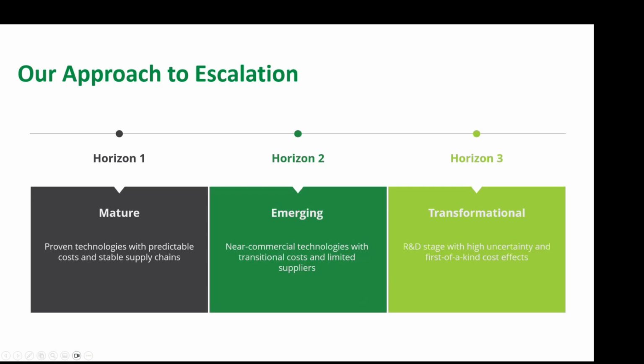Escalation was also an area that Transpower didn't have super long-term information readily available. So again, we worked with Mott MacDonald to come up with an approach for Te Kanapu. And so escalation in this context is the increase in project costs within an estimate over time. Transpower has a model for short to medium term, but we're looking at much longer time horizons.